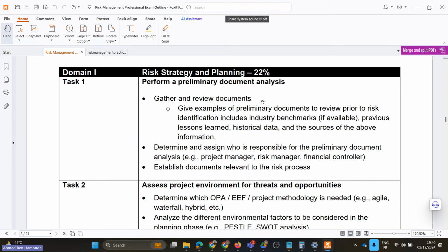So that lessons learned can serve as an input for managing the risks in your new project. And if you are managing a project that is similar to an old one, those issues which have occurred in a previous project, as part of the lessons learned, will serve as a risk identification source. They will serve as a source of identifying potential risks for the current project,